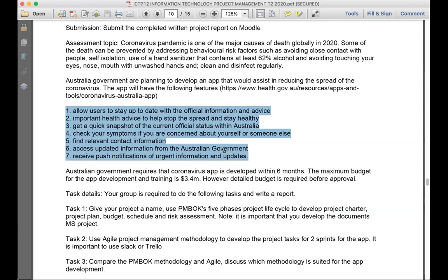I want you to show me that you are assigning wages for those people. I want you to show me that you've done research to uncover how much money each person needs to get paid per hour, not just simply put figures. I want you to show me that if any of the people or any of the tasks are showing in red, that means your people are being allocated to work more than 8 hours a day. I need you to do leveling for your actual plan in Microsoft Project.